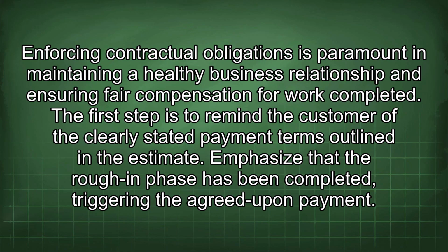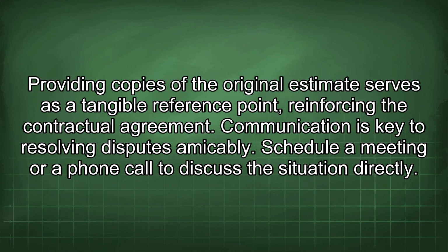Enforcing contractual obligations is paramount in maintaining a healthy business relationship and ensuring fair compensation for work completed. The first step is to remind the customer of the clearly stated payment terms outlined in the estimate. Emphasize that the rough-in phase has been completed, triggering the agreed-upon payment. Providing copies of the original estimate serves as a tangible reference point, reinforcing the contractual agreement.